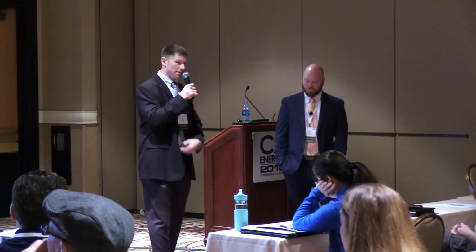We're going to look at the design review, see if we can figure out what's going on from that. We do our Retro CX plan, CFR. We do very detailed test forms, just like if we're doing regular commissioning, like new construction commissioning. We'll do investigation forms like installation checklists, a lot of times on a lab-by-lab basis rather than like a PFC for a terminal unit. But we'll do our test forms, and we do those in detail. We've got some examples. We do an issues log. We want to list out the issues, but then we also do the ECMs, energy conservation measures, and FIMs. We'll talk about those facility improvement measures, and a final report.